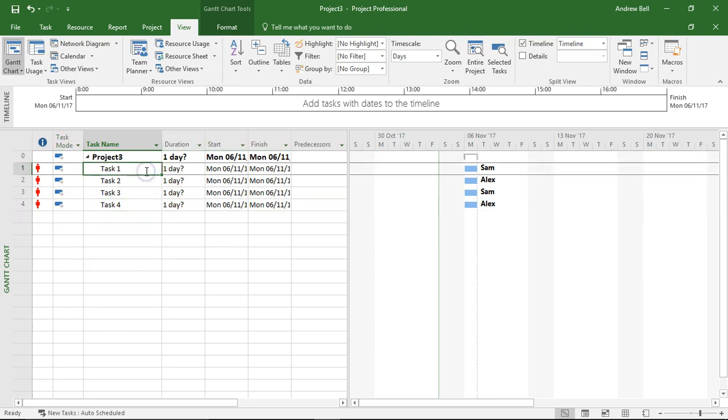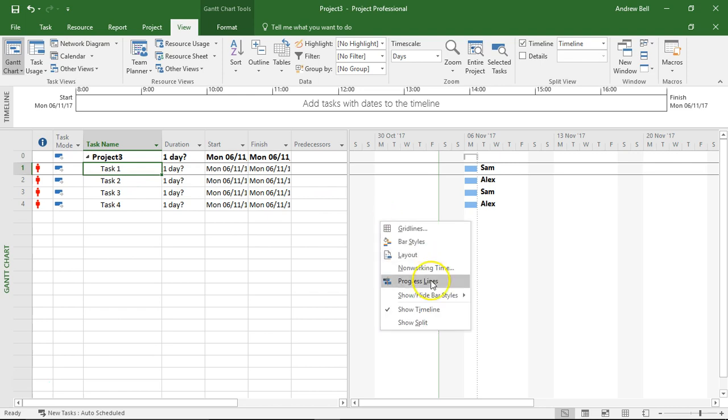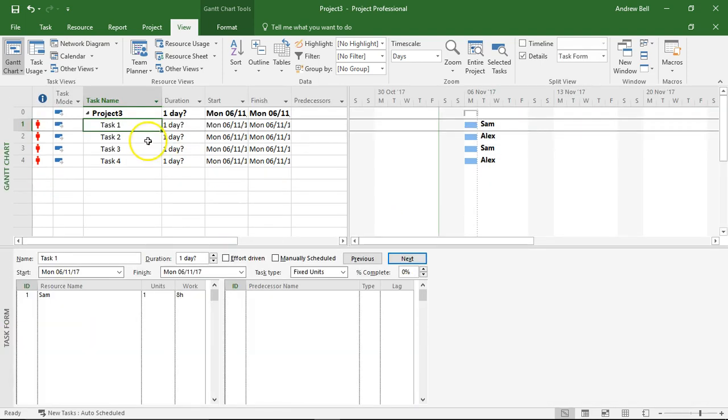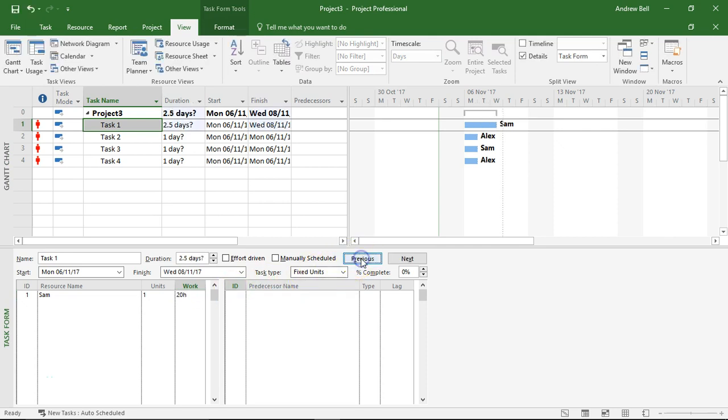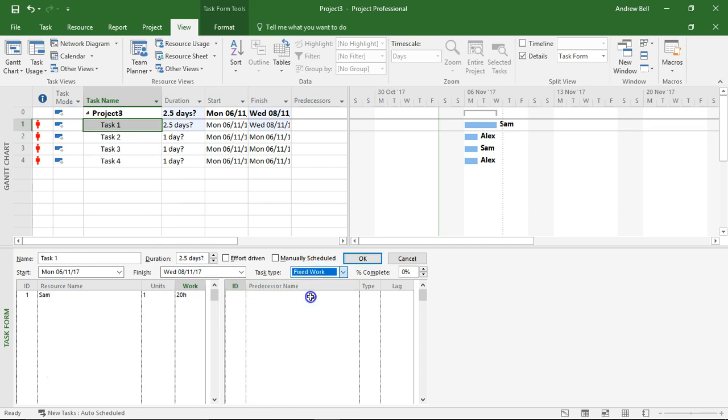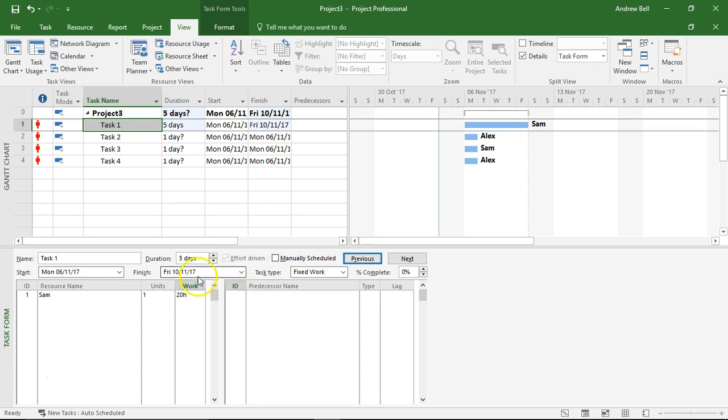Now then I need to enter exact amounts of work and duration for these tasks. So what I'm going to do is split the screen right click show the split. Task 1 has defaulted to 8 hours of work and I'm going to increase it to 20 hours of work. When I click OK the computer says that's two and a half days but I'm going to make this fixed work and make it five day duration. So Sam should be working four hours a day on that, we'll check that in a minute.